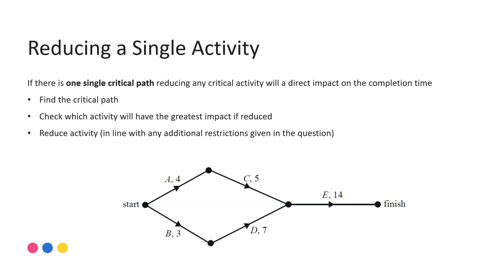When you are looking just to do a single activity reduction, any one activity on the critical path will have a direct impact when there is a single critical path. Then it's a case of checking which of those critical activities you should reduce in order to get the greatest impact — the greatest saving on that finishing time. There may be other restrictions or conditions within the question.